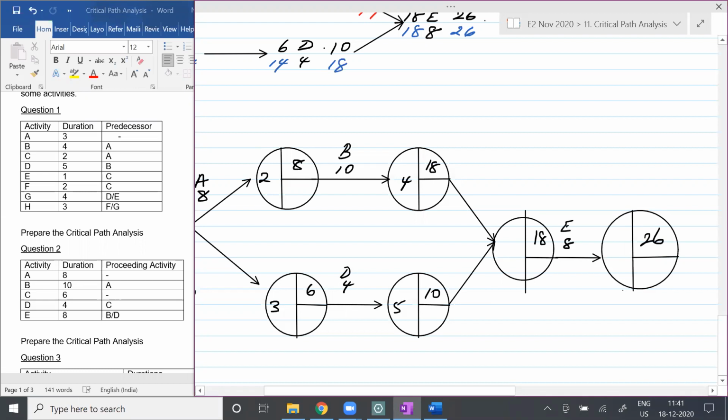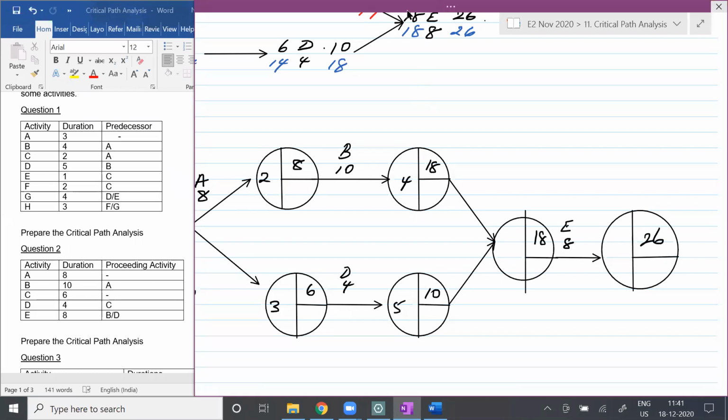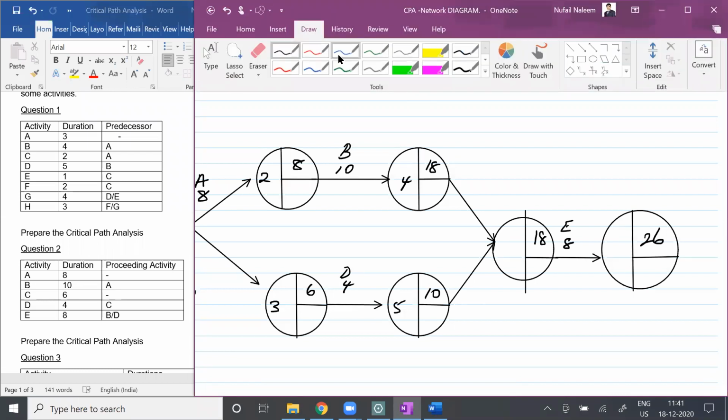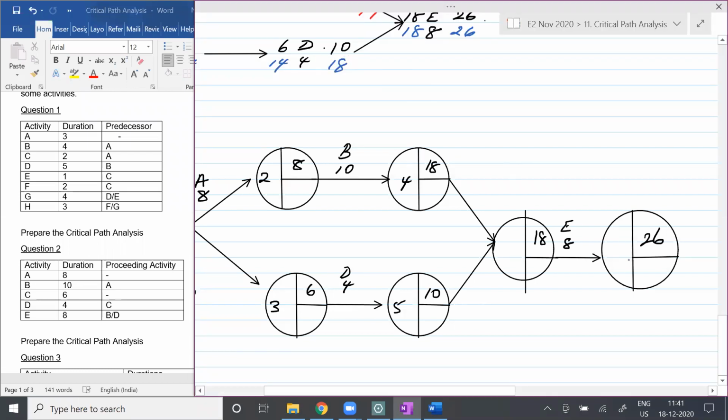Thank you. So students, can I start working with the latest time? So this is 6, this is 7. I will put here 26. So 26 minus 8 is how much? 18, right? Correct. Now, if you observe here, there is nothing to be subtracted. So I'll put 18, 18.